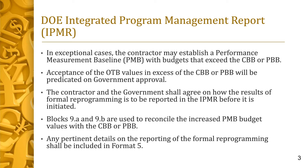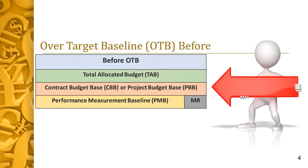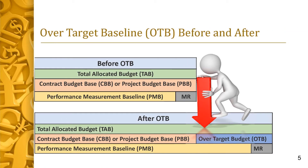Let's look at some examples of how the components of the CBB or PBB change as a result of an OTB. This chart shows EVMS budget building blocks before an over-target baseline. Before an OTB, the total allocated budget (TAB) is equal to the CBB or PBB. The performance measurement baseline and the management reserve summed to equal the CBB or PBB. After the OTB, the PMB and MR are increased by the total value of the OTB. In contrast, the CBB or PBB or project target for incentives is unchanged.